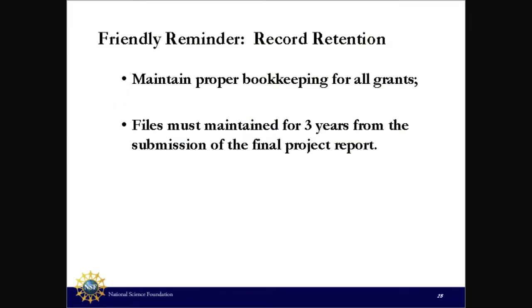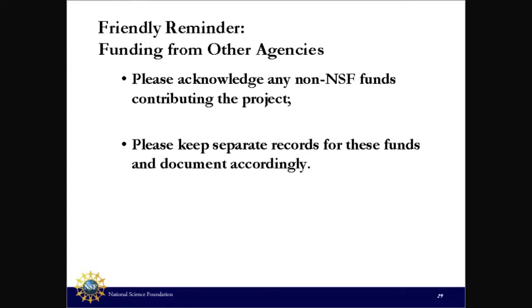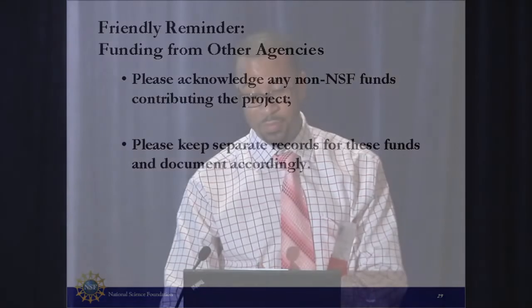Record retention. Make sure you keep proper bookkeeping, like with anything, if you have a business, just make sure that you keep your records. Files must be maintained 3 years from the final progress report. Please acknowledge any non-NSF dollars, any funds contributing to the project. We want to make sure who else in the federal government is actually contributing to the project. And please keep separate records. If you hear me, I keep saying keep records, records, records. Documentation, document, document, document. Because that's what will keep you out of trouble.